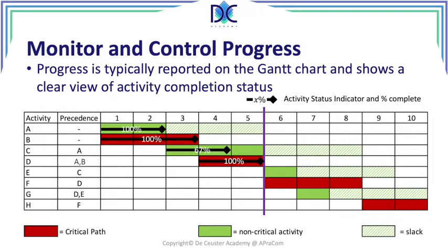This is a very important report because in this case, we see, for example, that activity C is only completed for 67%, where we wanted to have 100%. So here we created 67%, 2/3 in 3 periods, so that activity will take longer.